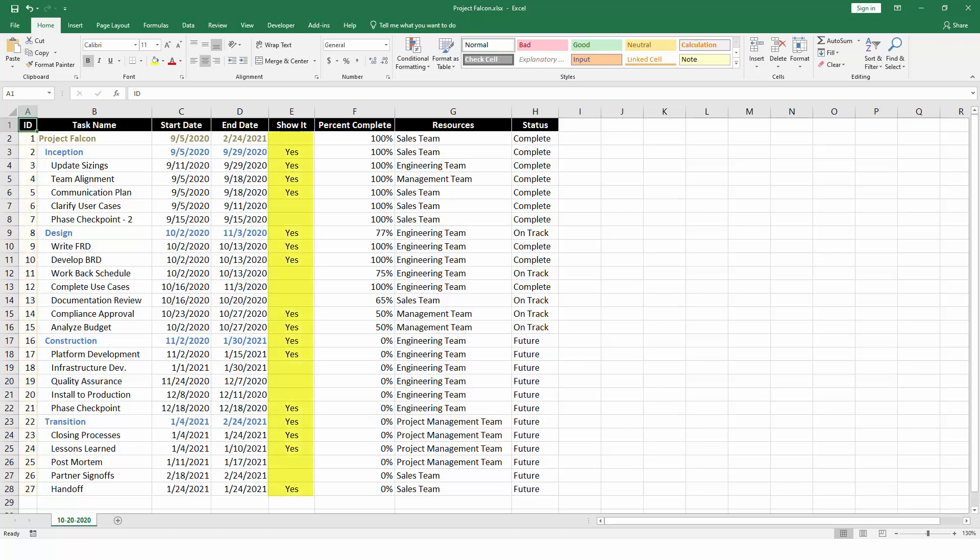We also need to decide which tasks and milestones to include in the chart. The easiest way to do this is to insert a filter field like we have here and place a yes next to the items that should be included. For tasks that you don't want to include, you can mark them as no or simply leave those cells empty.